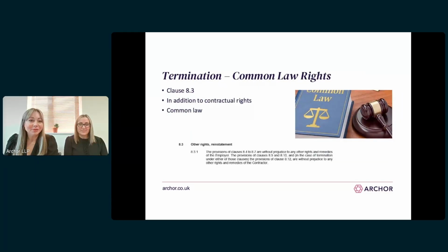Still on termination, clause 8.3 is really important for both parties as it makes clear that the employer's rights under clauses 8.4 to 8.7 and the contractor's rights under clauses 8.9 and 8.10, so that either party's rights to terminate, are without prejudice to any other rights and remedies that either party may have, i.e. those parties' rights at common law. So common law rights that are outside of the contract. So for example, there may be occasions where there is a repudiatory breach of the contract by the contractor that is not within the specified grounds for termination, but which the employer wishes to treat as bringing the contractor's employment under the contract to an end.